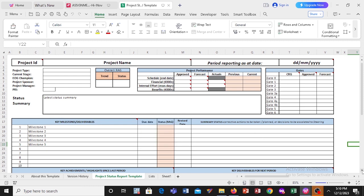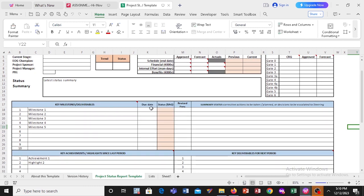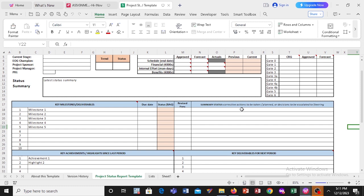And you go to this table below. In here you have the key milestones, the due dates. Were they achieved in the due date stated in the project document or concept? If your key milestone was maybe to develop a manual for the project and it was due by end of December, then you state that. If it was completed, you set the status as completed. If it's supposed to be revised and not simply completed, you also summarize here that maybe you need more time. You state the due date and then if it was completed or non-completed. If you have to take any corrective actions or plan any decisions, you state a summary here about that key deliverable or milestone you've achieved in the project.